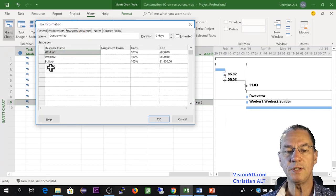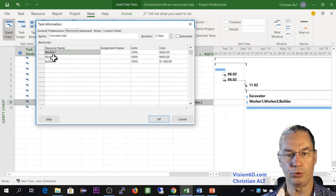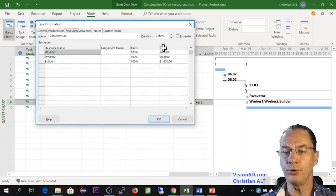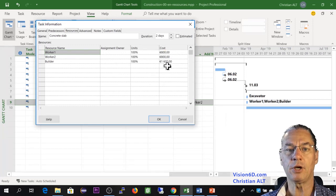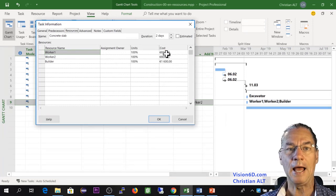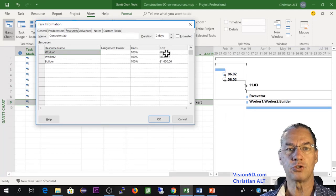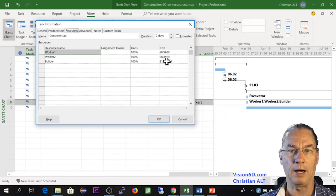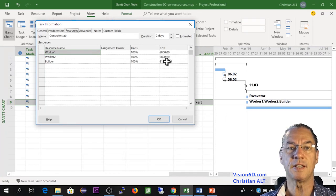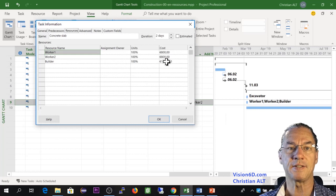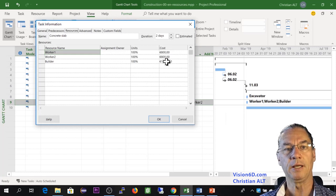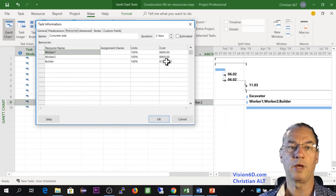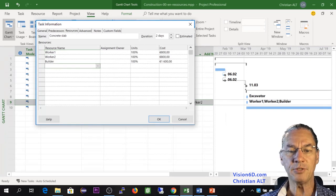You see here that I find the builder, the worker one and worker two. I will also show you here that there is a cost that was calculated according to the hourly rate of each resource. And this multiplied by the number of hours. In our case, it's 16 hours since we said that this task is going to last two days and two days containing each eight hours.